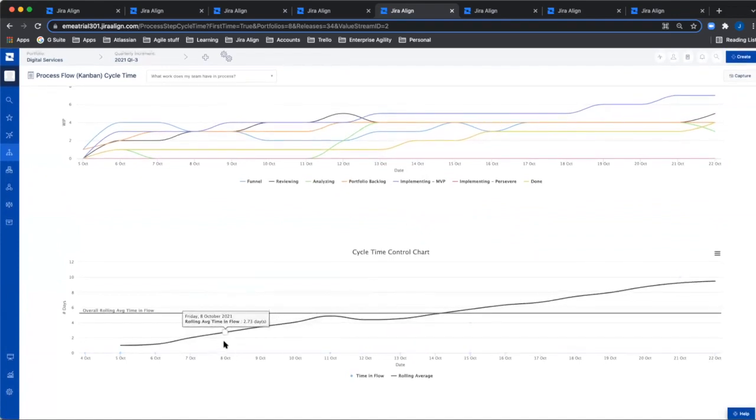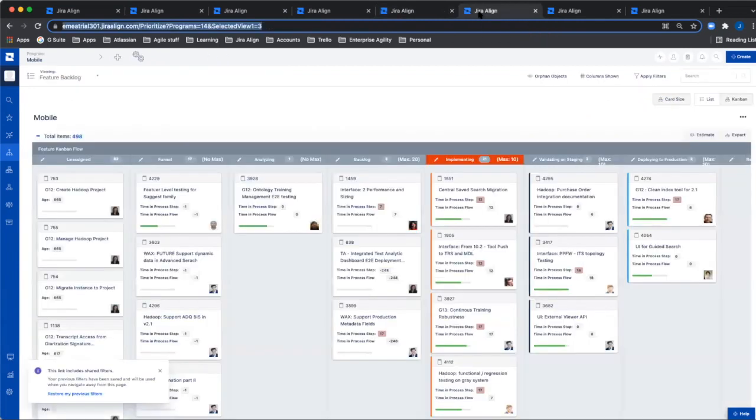And what we're also seeing are these trends. So what the leadership team needs to be looking out for is that this is not continuously going up, because this tells us something is breaking Little's law, right? If we can see our average rolling time constantly increasing, it means we're probably going to reduce some throughput throughout the system, right? So we also mentioned that you've got the ability to look at the various flight levels, those various Kanban levels.